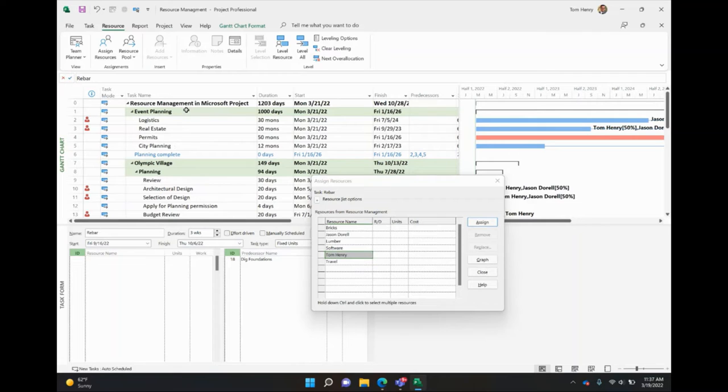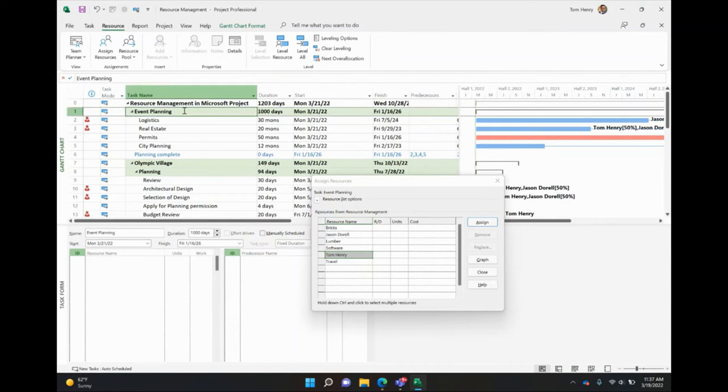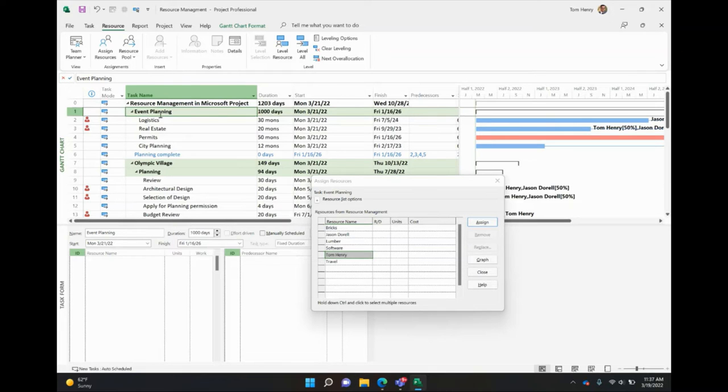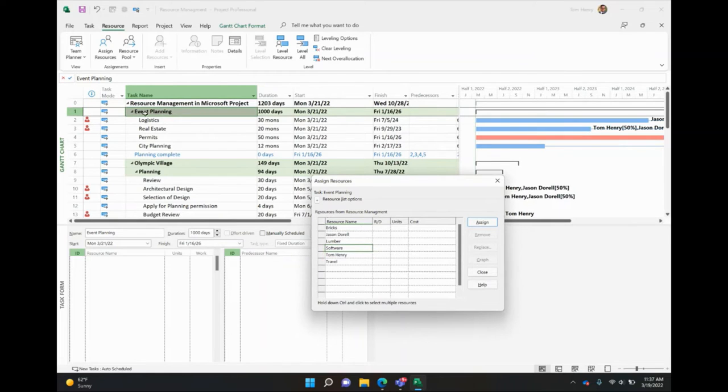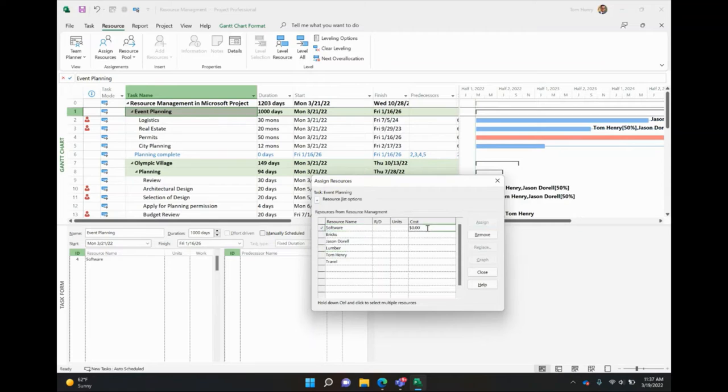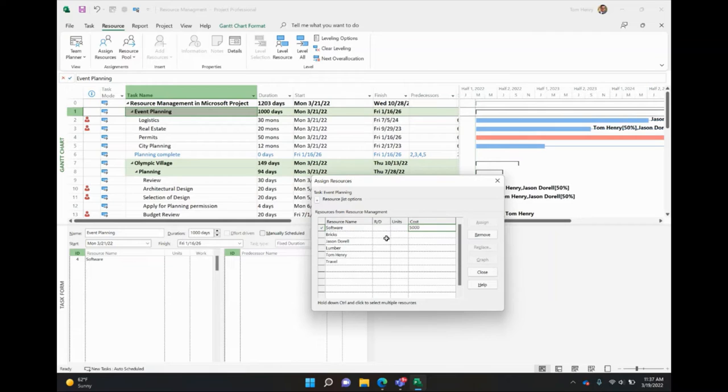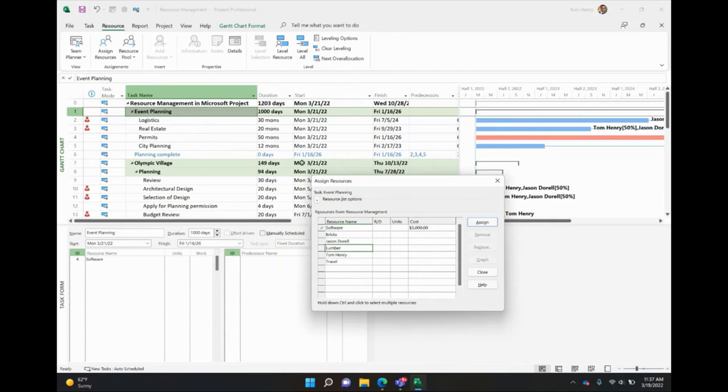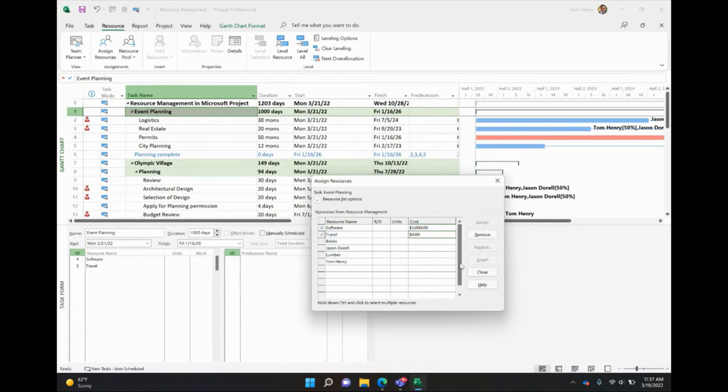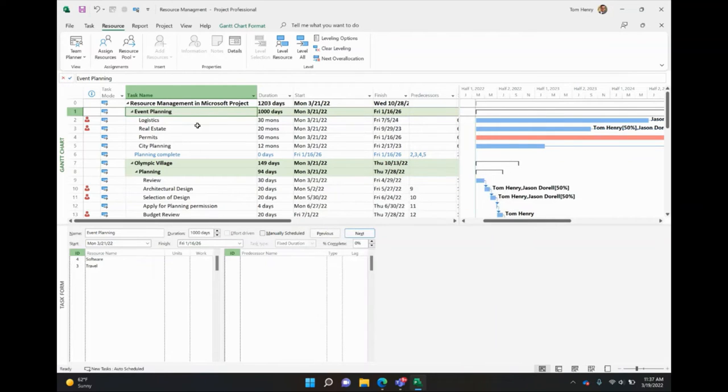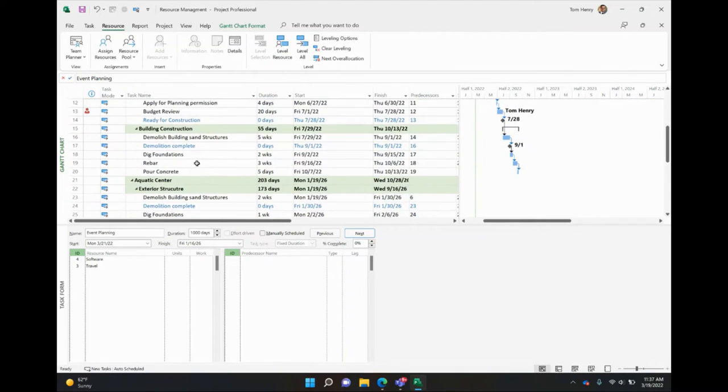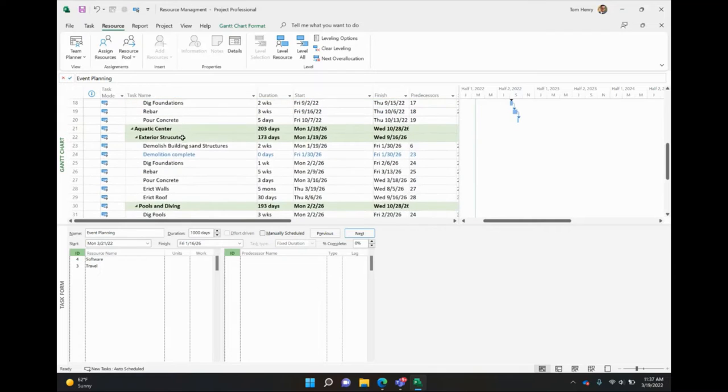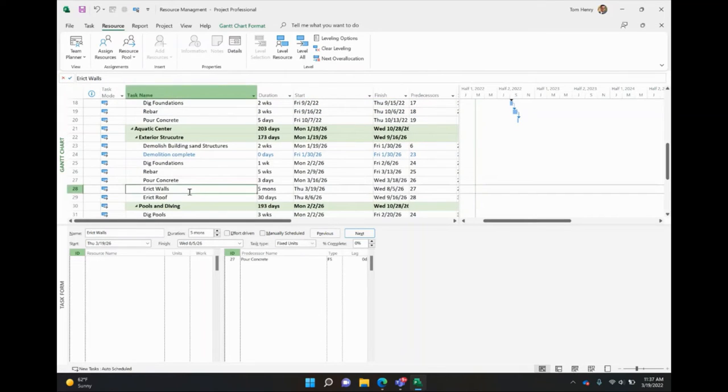Let's talk about our materials and our fixed costs now. Cost resources, software, travel. It's a best practice within Microsoft Project when you're assigning these fixed costs to assign them at the summary tasks level. You should never assign work resources at the summary task level, only your fixed costs. So I'm going to come in, add some software budget to the event planning. I'm going to assign it. And at this time, once it's assigned, I'm going to give it a $5,000 budget for event planning. And that will be throughout this 50 month period, long time. Again, I can do the same thing for travel, click assign and come in and say maybe $4,000. Good. So that's assigned. Last thing I want to show you is materials.